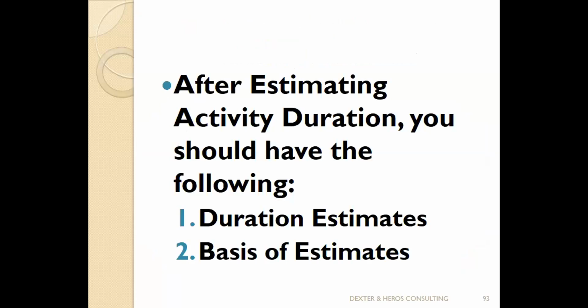And please, I didn't say it the last time, but let me say it now. Anytime you make any of the 3 estimates, always tell us the conditions on which you're basing your estimate. This duration estimate is based on the following conditions. 1, that out of the 20 people needed for this project work, 15 will be from the company and 5 will be hired from outside. 2, that the following equipment that will be needed, 1, 2, 3, 4, 5 will be rented from outside, whereas the company will make the other ones available. These are the conditions on which you're basing your estimate.